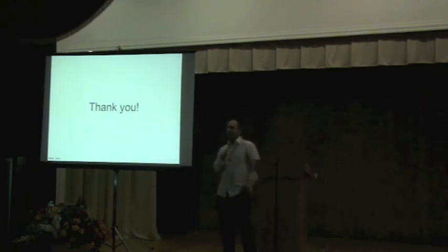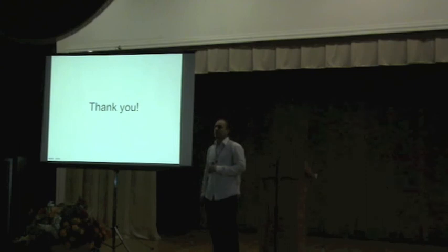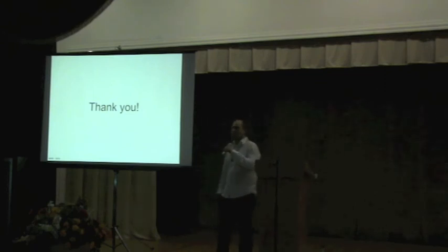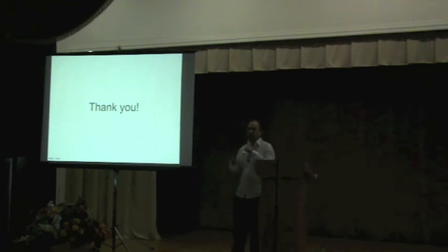Hi, I'm Łępicki. I just wanted to ask about the rules of defining the points quantity for each story. So why limit to 8 points in sprint planning? Okay. The answer is, well, we use the scale of points that are 0, 1, 2, 4, 8, 16, 32, and 64, I think. And developers like it because it's cool. It's powers of 2.